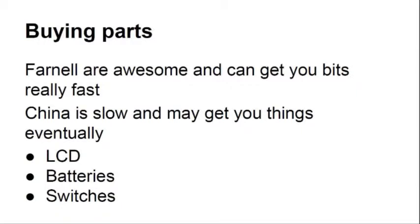And the sales guy said, yeah, I can confirm it with my boss, and we should be able to get you a sale or return on these things. He got confirmation 3 days later, and they pre-allocated me the stock, but they only pre-allocated 800, because the others that were in stock had already gone out by this time. That was about a month before we started getting towards manufacturing.